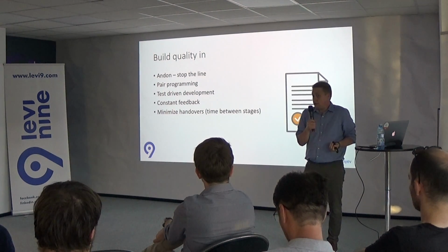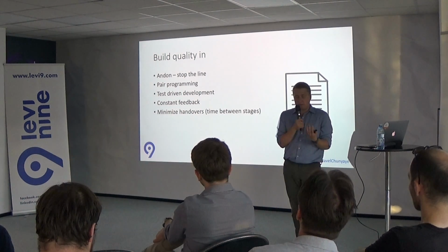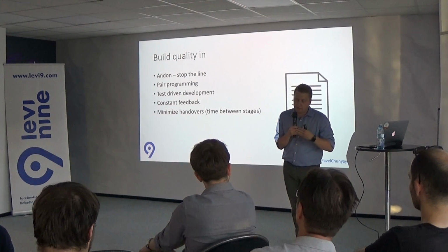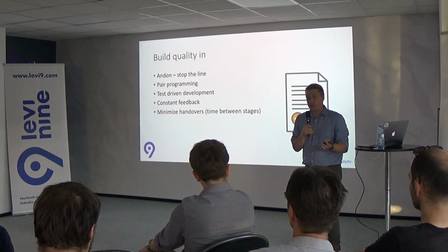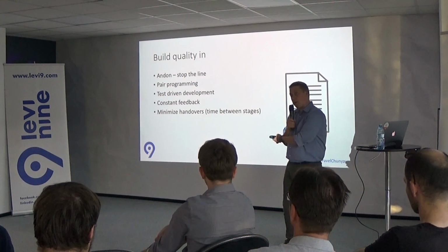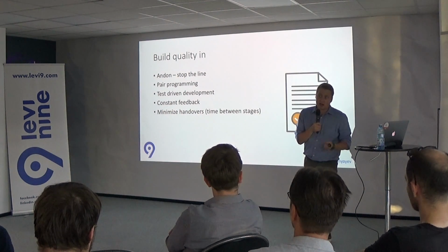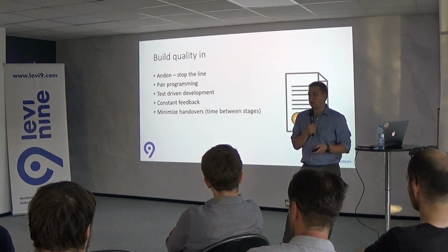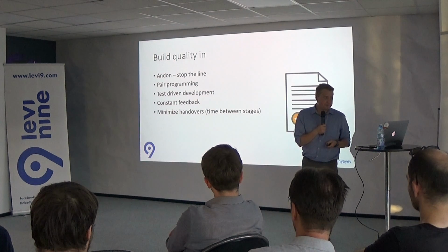Because then it's one responsibility and you can optimize the flow and implement the feature as soon as possible. If you need to implement something, then wait for another team, then wait for another, or in the example, you've implemented some work and then you're waiting for a QA engineer to test it manually. This all creates waiting time, and in most cases, a lot of knowledge is lost on these handovers. And they don't make sense.